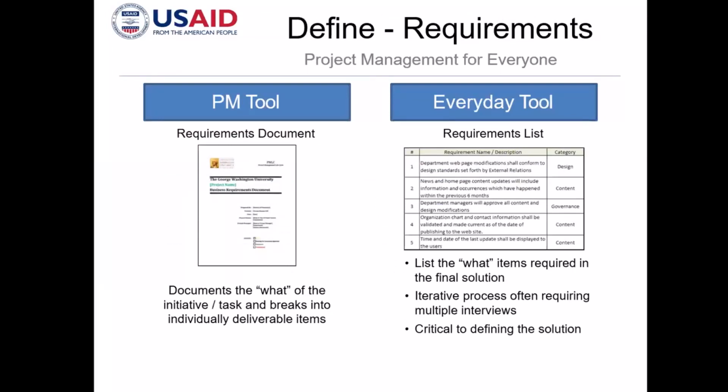So the requirements document is just an appendix of the project charter. The major document that you have to produce is the project charter, the high-level contract, right, that we have mentioned. But I specified here a requirements document that should be attached as an appendix to the project charter, so that there would be no other things left behind in defining the requirements, because the requirements list is already the outline of your scope, right?